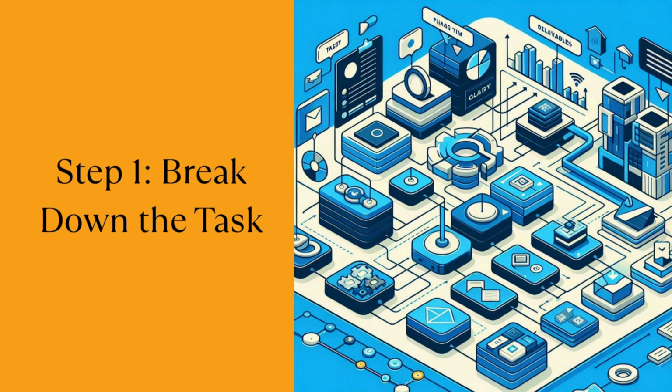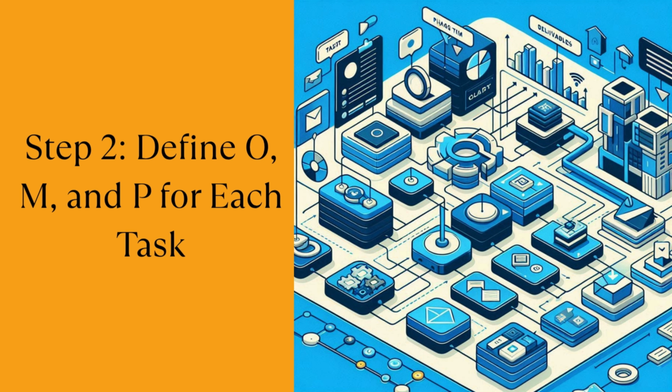Step-by-step guide to using 3-point estimating. Step 1. Identify the task or activity. Start by breaking your project into estimable components, tasks, phases, or deliverables. This makes your estimates focused and specific. Step 2. Define the 3 estimates. For each task, work with your team or stakeholders to define.